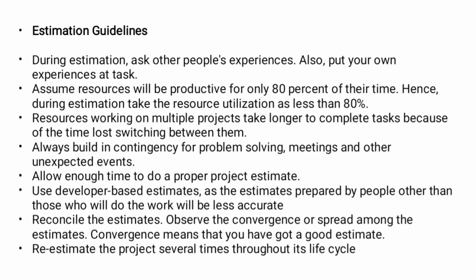Use developer based estimates, as estimates prepared by people other than those who will do the work will be less accurate. Reconcile the estimates. Observe the convergence or spread among the estimates. Convergence means that you have got a good estimate. Re-estimate the project several times throughout its life cycle. Thank you.